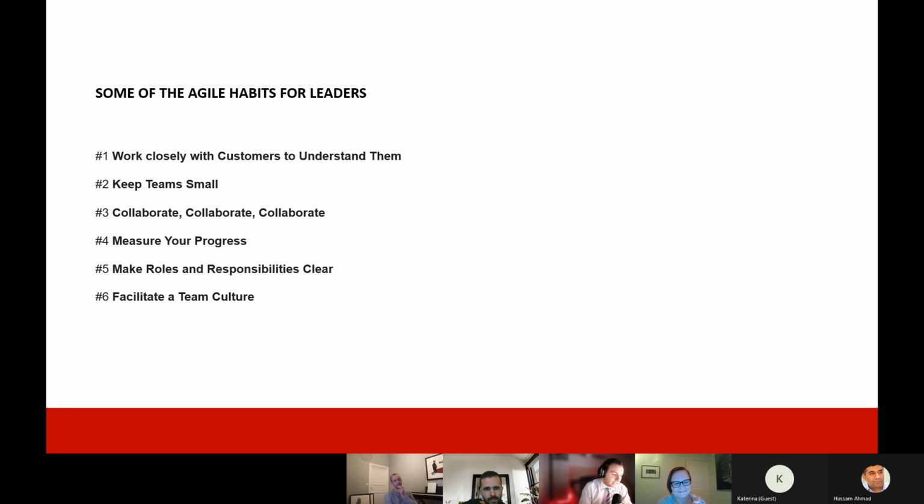If I would have a new team, I would first of all, like we talked in the beginning, schedule the most important framework within the calendar so that it is always equal. You don't need to do many of them, but maybe 1.5 hours together as a team, these focus hour bubbles. In the retrospective, you can talk about what disturbed you in this hour, and always optimize to make this holy hour better and better over time.